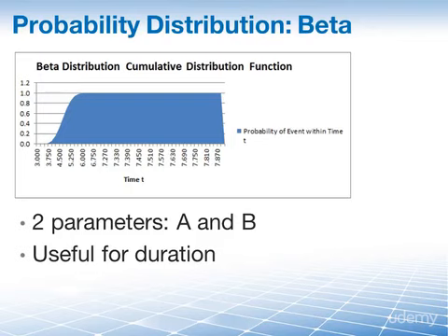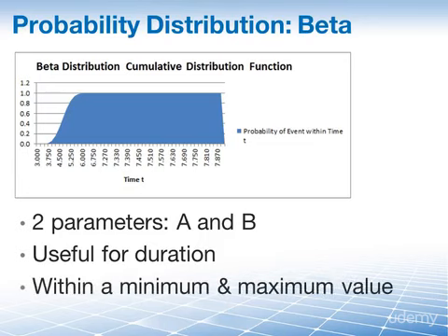If the project team is given the minimum and maximum durations, then the beta distribution method can be used to estimate the likely amount of time it will take to complete a project activity. Beta distribution models events which are constrained to take place within an interval that is defined by a minimum and maximum value.